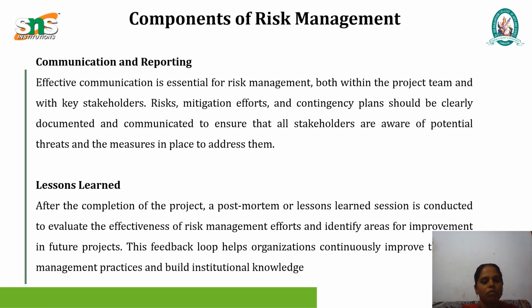So lessons learned. What are the lessons? We are learning from the components. After the completion of the project, a postmortem or lessons learned session is conducted to evaluate the effectiveness of risk management efforts and identify areas for improvement in future projects. This feedback loop helps organizations continuously improve their management practices and build institutional knowledge.